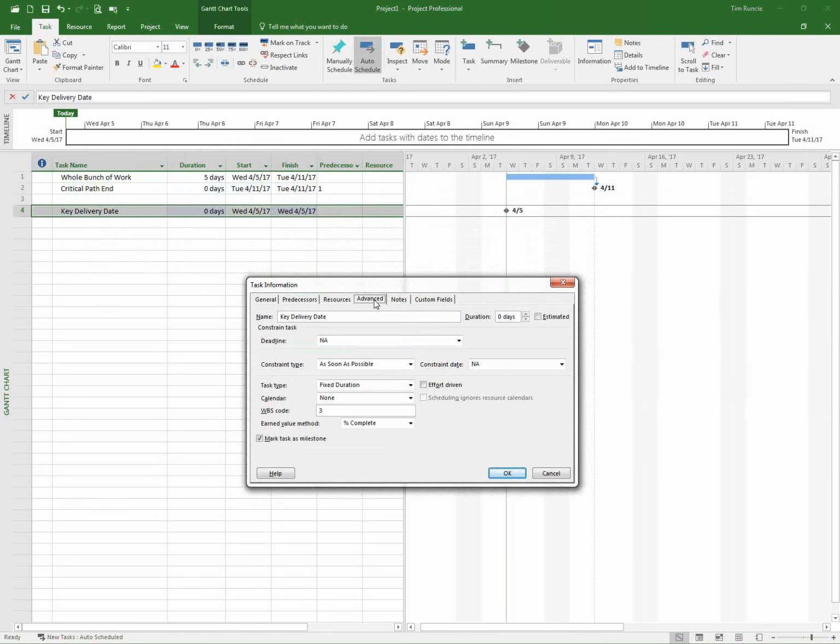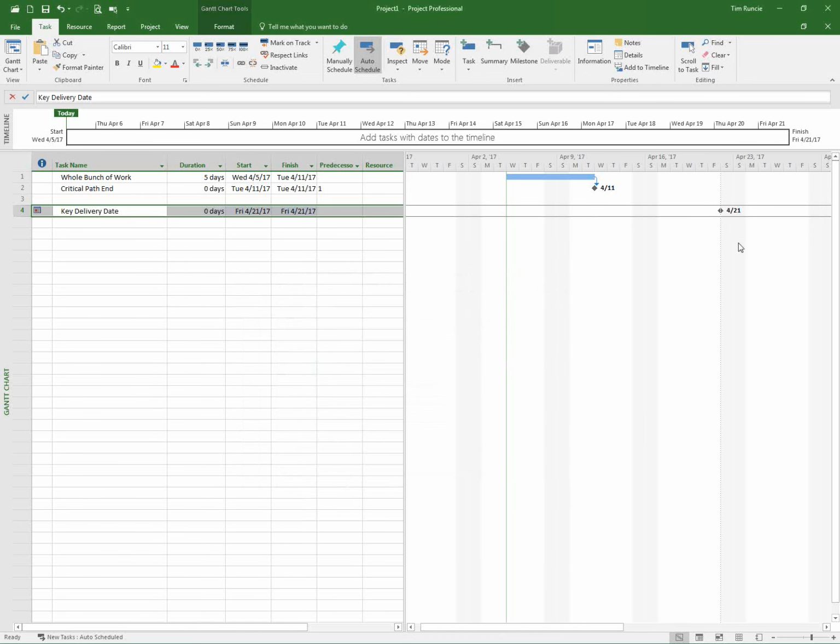But if I come in here and say, you know what, this is kind of my end date I need to watch, even though I might have flexibility to ebb and flow and slip, I'm going to force this task to be must finish on. And then why don't we schedule that to be finished on, say, the 21st? Okay, there we go. If you're looking closely, I've got a milestone at the end here. I've got my schedule, and it looks like I've got a little bit of float or slack, a bit of a buffer that I can work with.